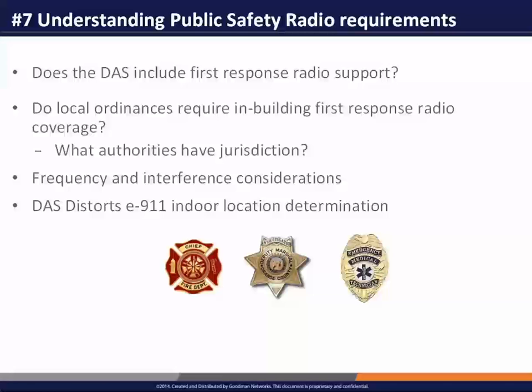The next key is understanding public safety radio requirements. And this is becoming very important, particularly in campus environments, with the concerns we've had with incidents on campus, as well as ordinance requirements that are demanding property owners to verify that coverage exists in their current buildings or buildings that are being planned. If you're building a new building, oftentimes they'll withhold a certificate of occupancy if you can't demonstrate that you have good public safety radio coverage in that building.